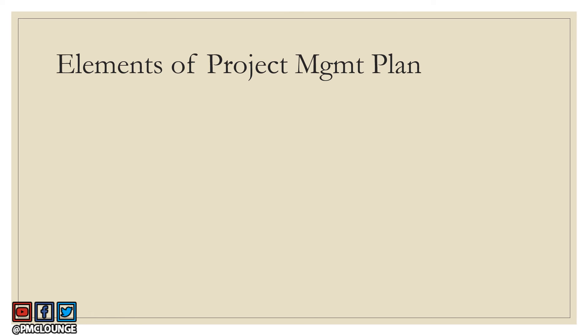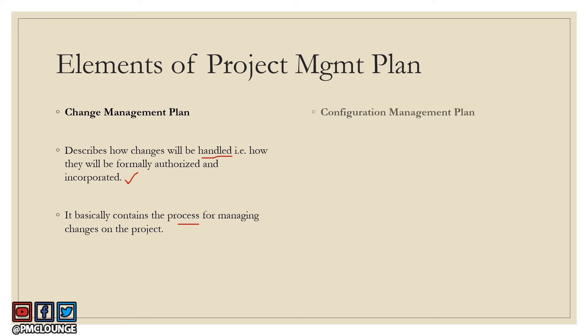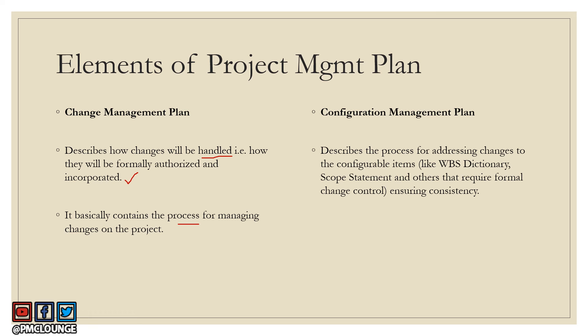The 14th element is the change management plan. This document describes how changes will be formally authorized and incorporated in the project — any change of any nature that shows up, and the process for managing it. The 15th is the configuration management plan, which describes the process for addressing changes to configurable items — not changes to the project itself, but to items like the WBS dictionary, scope statement, and any formal document or deliverable that requires change control.